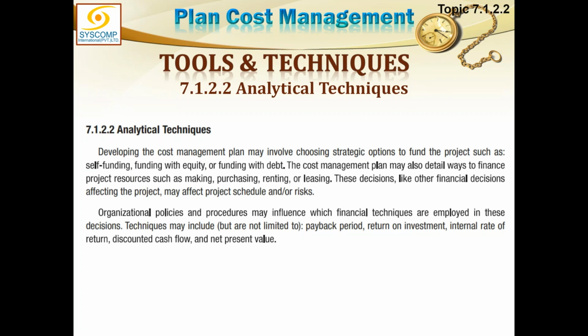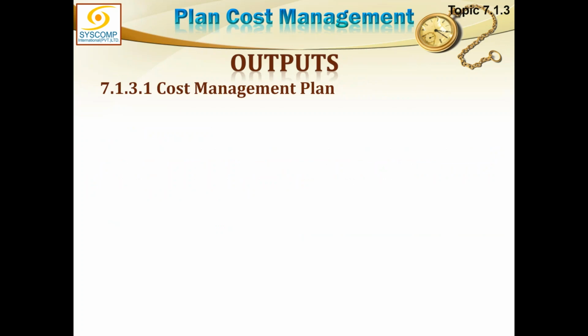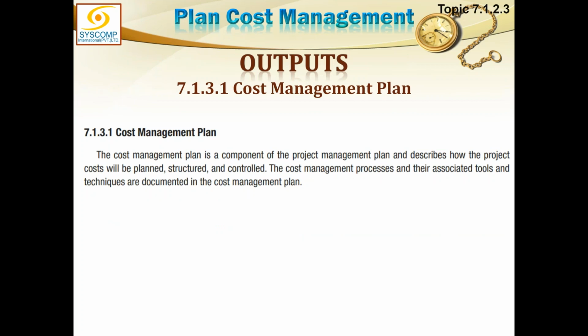Organizational policies and procedures may influence which financial techniques are employed in these decisions. Techniques may include payback period, return on investment, or whatever we have studied earlier. Meetings with your own team members and the stakeholders to agree on ultimately the cost management plan. The cost management plan is going to form part of the project management plan, and it gives us the detailed instructions and guidelines for how to plan the cost, how to structure it, and how to ultimately control it.